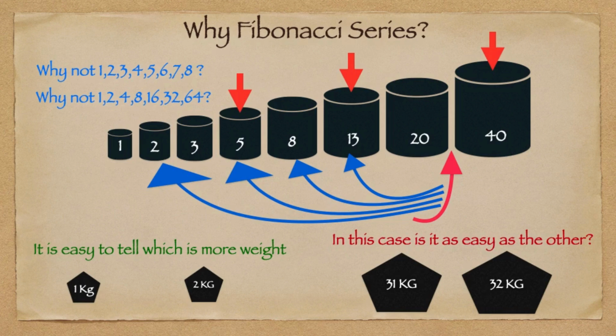That is why if you use sequence numbers like 1, 2, 3, 4, 5, 6, 7, 8, the team will have difficulty when the items are larger to identify the precise number. And that's the reason we are using the Fibonacci series here. The modified Fibonacci series, which is 0, half, 1, 2, 3, 5, 8, 13, 20, 40, 100 like that.